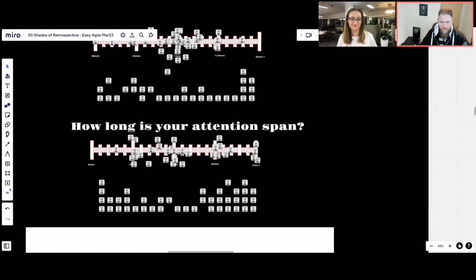To quote the immortal words of Elvis Presley, try, if you're currently doing a 60-minute retro, shorten it to 45, shorten it to 30, in fact. If you're doing 4 prompts as a retrospective, i.e. liked, learned, loved, lacked, take it down to 2 or 3. Do the prompt, identify something, pull an action out of it as you go along, capture actions as you go along, as Casper says. And then if you've got a few actions, that's great.